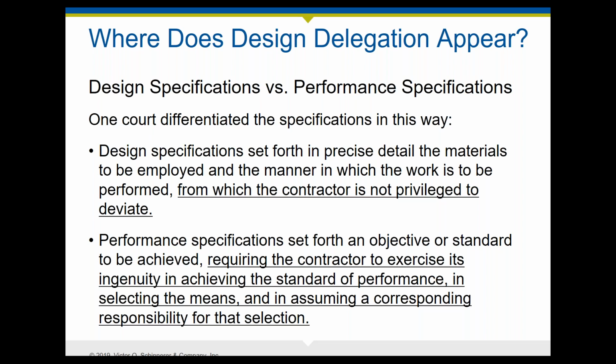Now, in some states, that has been a slow process, in that there are some states that still say even if you delegate design to a contractor, and that contractor flows that down to a specialty contractor who might either design it in-house through its own licensed design professionals or contract out to a licensed design professional for the design, that the responsibility should still stay with the original design professional. Because when that original design professional signs and seals its documents, it's telling the owner and it's telling the rest of the world that it takes responsibility for that entire project.